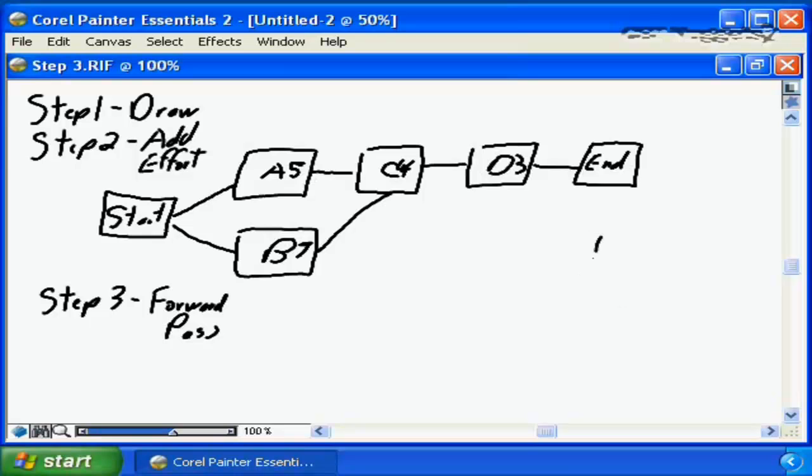Before we go there, let's put together a bit of a legend for how this network diagram is going to flesh out. In this top left corner, we're going to enter the early start date for each of the tasks. In this upper right hand corner, we're going to enter the early finish date. In the bottom left hand corner, in step number 4, we're going to define the late start, and in this bottom right hand corner, obviously we're going to create the late finish. So with that in mind, we're going to go through and calculate our forward pass.